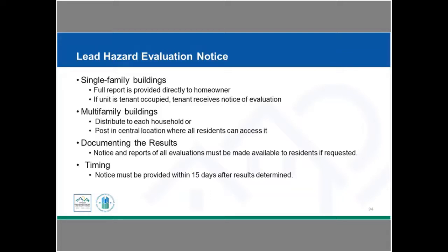Keep in mind that the full evaluation information is a public record, so we could provide a notice to the households, and they could say, I want to see the full notice and report, and you need to make that available to them if requested. And again, we have a 15-day timeline to make sure that the notification process has happened.